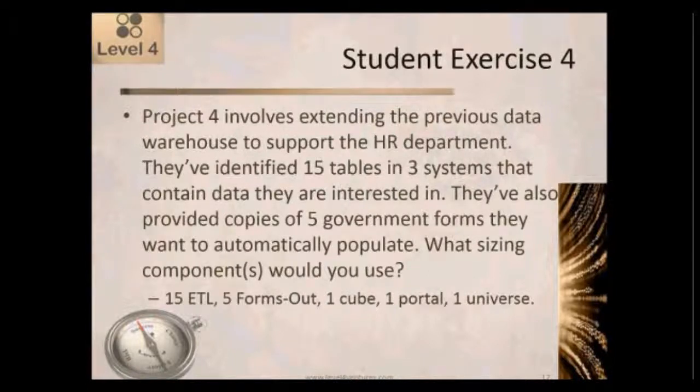On the other hand, let's say that we had a simpler application, like maybe a ClickView, or that Oracle BI or SAP Business Objects or whatever was already installed. And so that piece was already done. And now what we're working on is the CFO has a set of capabilities that they want to add to that are going to involve access to the data and getting additional data into there and more data connectors and so on. I would probably use a combination of the data warehouse components and the business application components to estimate those pieces.